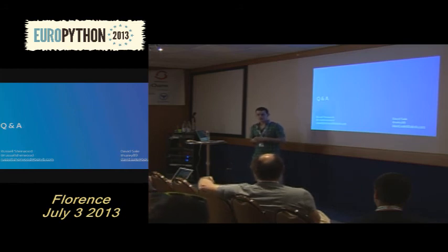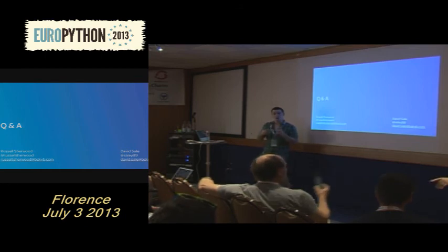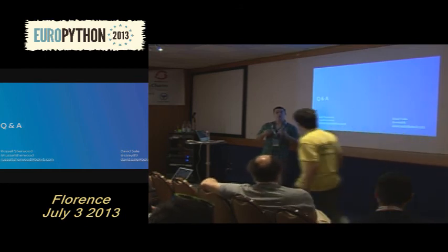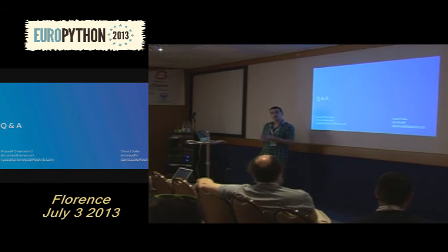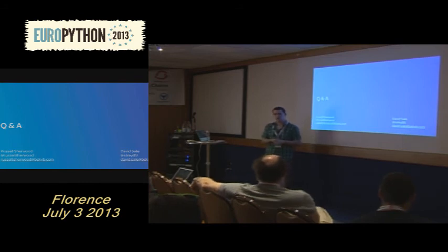Well, you see, the difference is that in the waterfall methodology, you'll get all the requirements up front for the entire project. While in an Agile team, the analyst will just get the requirements for that specific time. So they just want to get the requirements, for example, for what's going to be delivered in the next sprint, and it will be an ongoing cycle. So you'll continually get new requirements from your client. Does that answer your question? Thank you.